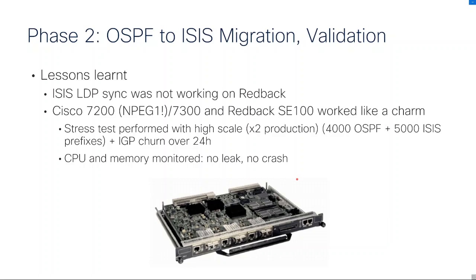The other big surprise was the legacy. We were very afraid that the Cisco 7200 and the Redback SE100 would not scale because those were very old devices with very small CPU and very small memory. We spent a lot of time testing scale — with a traffic generator we injected a lot of prefixes and also injected churn over 24 hours just to see how the routers behaved. At the end it just worked. We doubled the scale in the lab to have some headroom, and ultimately there were no crashes, no memory leaks — a very big surprise.